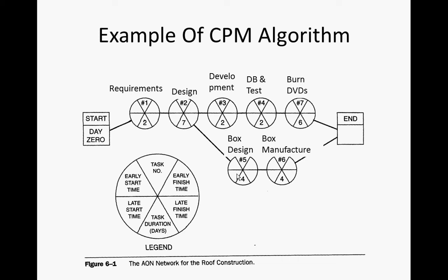Okay, so this guy here. 9 and 13. Okay. This guy, why 9? Okay, good. 9 and 13. This guy, 13 and 17. Okay, now this guy, 17. Okay. So how did you get that number? The maximum of all nodes that enter into it. This guy cannot start until both of these guys are finished, right? We can't start this guy until these ones are complete, and this one is the binding constraint, the 17, right?